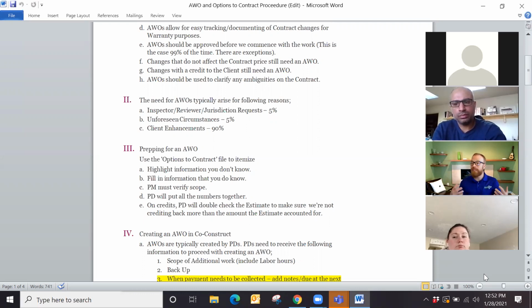So the unforeseens a lot of times have to do with what is normal construction. And that's what's sometimes tough, what's typical, what's a standard construction. And we always have to then go benchmark standard. Right. And a lot of times those individual items need to be game planned behind the scenes. Would anybody here think that a 7-inch slab would be standard? Right? No, because a standard slab is going to be a 4-inch slab.